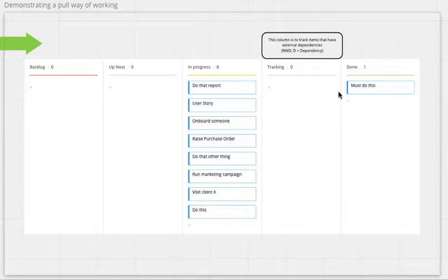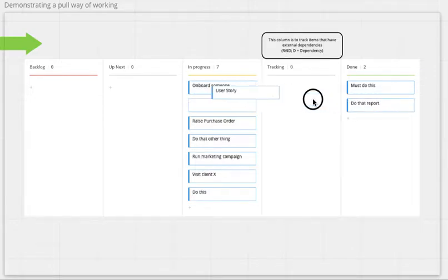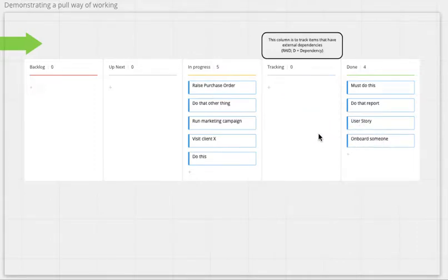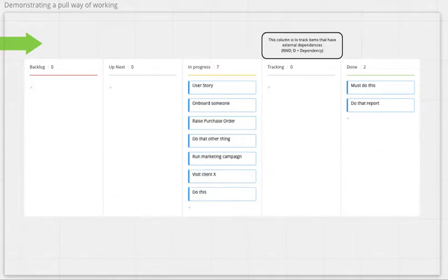And if that took 3 days, and that took 5 days, and that took 2 weeks, and that took 1 day, then you can measure the average, so that for future work, you can get some kind of sense of when this portion of the backlog might be delivered based on historical throughput, historical flow. But if everything is stuck and in progress, the software can't measure that.